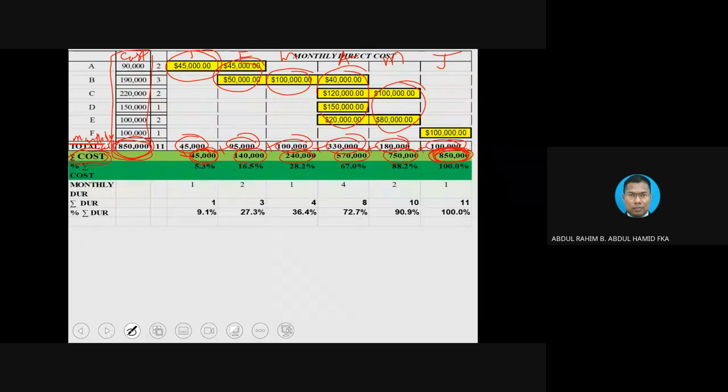If, for instance, at the end of the day the amount is not equivalent to this amount, it could mean something is wrong with the monthly amount, because when you draw the bar chart or take the proportion of the bar chart wrongly, then the amount will not be the same.